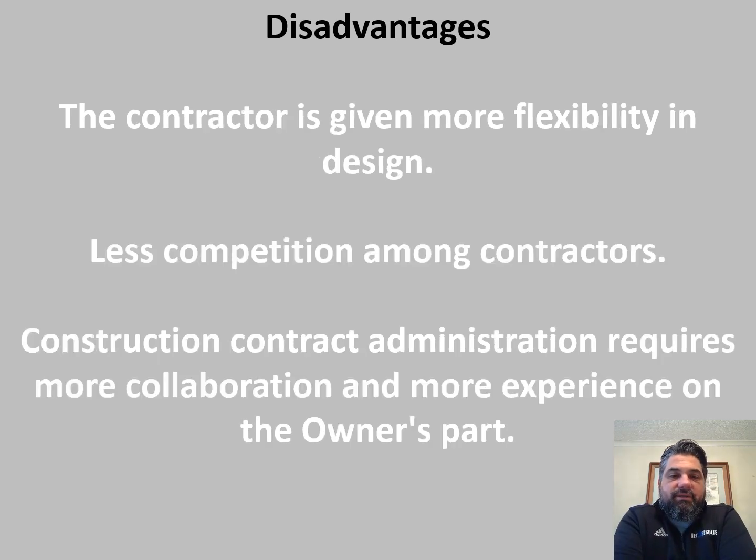Some more disadvantages is the contractor is given more flexibility during design. So whatever the owner loses, the contractor picks up. There can be less competition among contractors. A design builder will say, well, I will build it for this amount, and just as long as they're the lowest amount, that means they can pick whomever they want under that scenario to construct for subcontractors to construct the project.